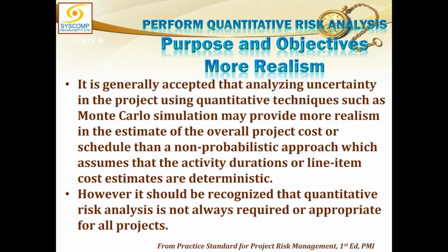So, if I ask them how much time this activity will take, then maybe most of the people are saying 2 days, 3 days, 4 days. So, the most frequent responses are 2, 3, 4. But I must cater for a pessimistic and an optimistic view. What is the worst case scenario? Is there anyone with a highest figure and a lowest figure? So, those two impossibilities or outliers, you can say, can also be considered. So the worst case scenario is this activity will take 10 days, and the optimistic view is it takes 1 day. So the most likely is, say, 2, 3, 4, so I take 3 days. So I have a pessimistic view of 10 days, an optimistic view of 1 day, and a most likely view of 3 days. This is how this data is generated.